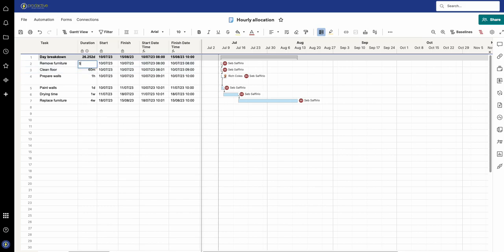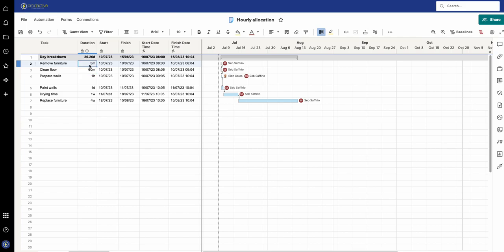If I now change this to be five minutes, 5m, you can see it starts at 8 and finishes at 8:04 with the next task starting at 8:05 for five minutes.